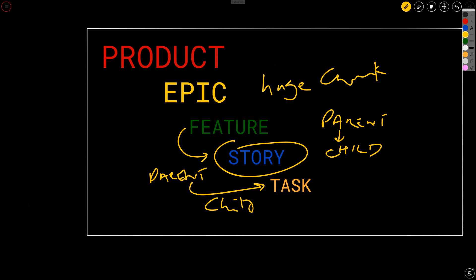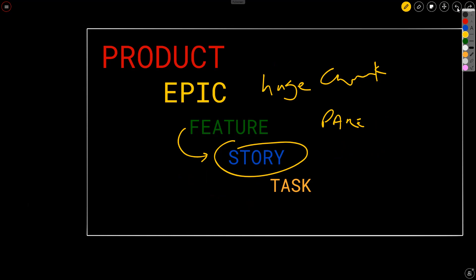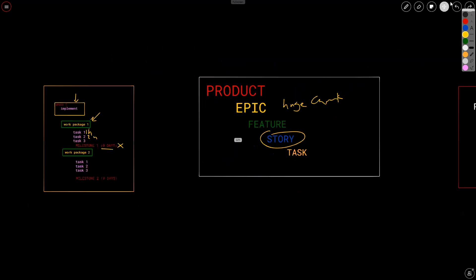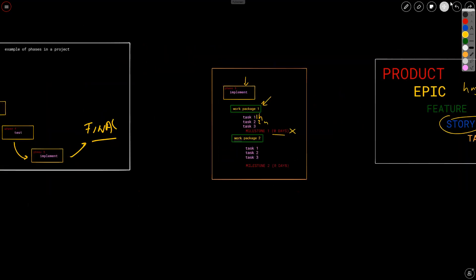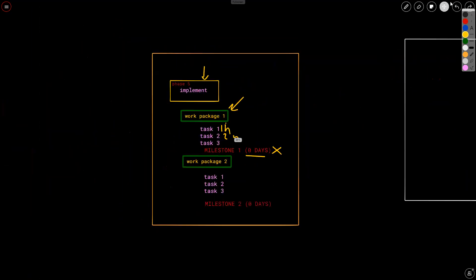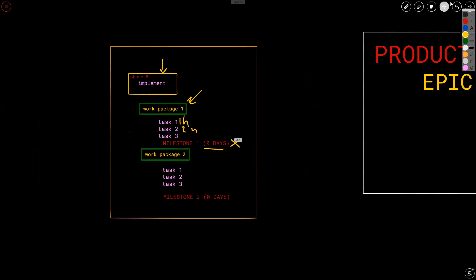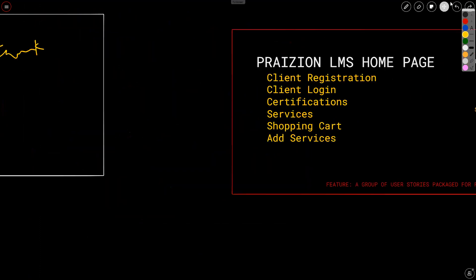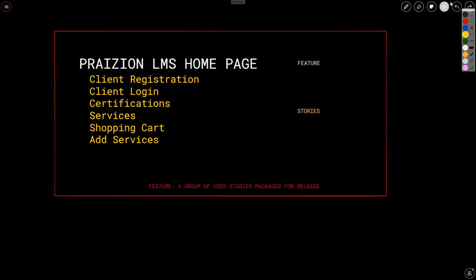Tasks are the child of the story, if you will. But in the world of Agile, a lot of folks don't do tasks because the idea is if it can fit within a sprint, why waste time breaking it down, breaking it down into hours and hours and hours? So now you've got an idea of how this works in the world of products, epics, features, stories. And now you can see where tasks lie in this world of Agile versus in this world of predictive.